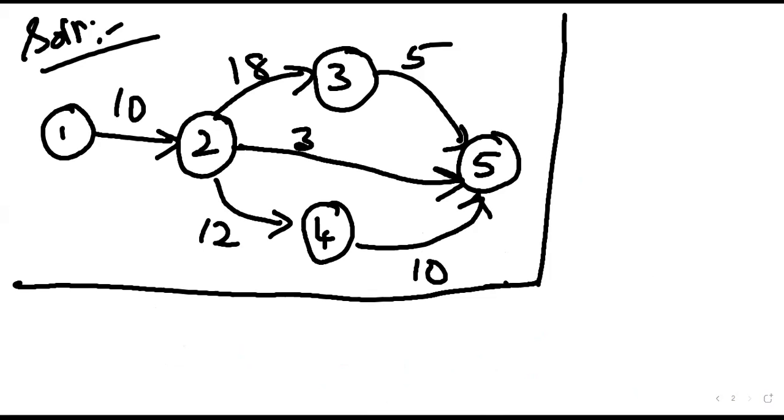The network diagram is done. Next, we have to determine E1, E2, E3, and so on. Why? Because we have to solve for the question first. L5 has to be determined, right? So L5 will be equal to E5, which is equal to the project completion duration. Whichever is comfortable for you, you can start the solution with the same thing.